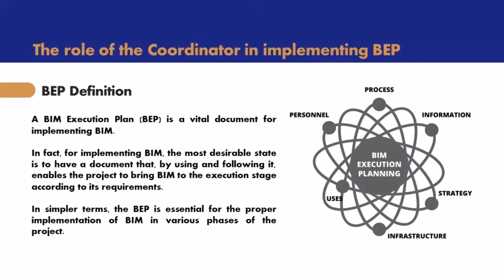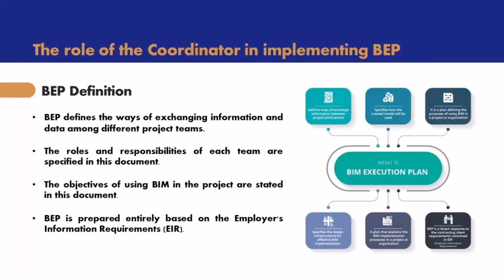Alright, in fact, in BEP, we write every single detail that we need in a project. For example, what are the goals of the project to use BIM? Or for example, what standards do we use in a project? Or what kind of formats we want to use for our files?